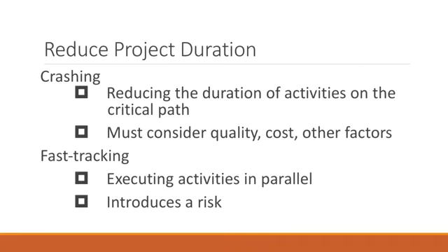One of the ways you will reduce the duration of the activities on a critical path is by adding more resources to that particular path. Remember, during this lecture, I told you about the trade-off. You can put in more resources, which will actually increase the cost. You must consider the quality, the cost that is going to increase, and other factors. But once you put them in, yes, you are probably going to reduce the duration of the critical path.